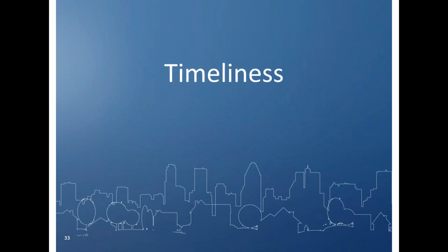So if you set up, for example, all of your small business loans as one DRGR activity, at a minimum the timesheet has to go down to that level so that you can attribute their activity delivery costs to, in my example, the business loan program, or the homeowner rehab program, or the rental rehab program, however you set it up. Again, in order to track activity delivery costs to projects in DRGR, you want the timesheet at a minimum to match however you set it up in DRGR.